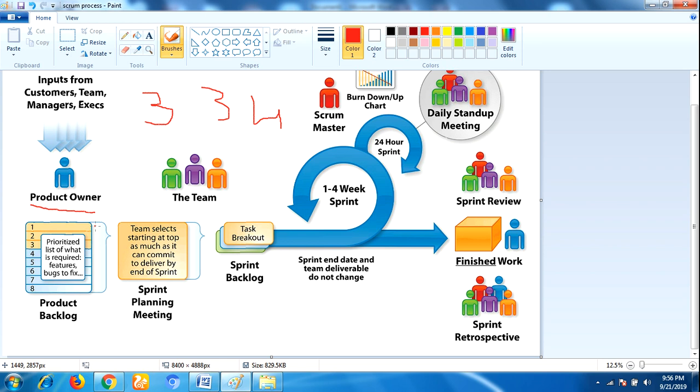Okay, so the product owner will prepare the functional requirements, that means epics and stories. These stories will be given to the sprint planning meeting. In the sprint planning meeting, the Scrum Master, developers and testers are involved and they will commit to those stories.